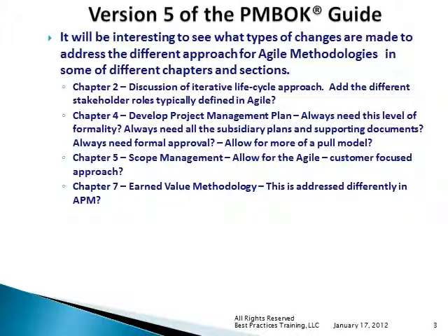In Chapter 7, Cost Management, where they're talking about earned value, I would definitely heartily recommend that they address earned value in Agile, that we can't do the traditional types of earned value techniques and measurements in Agile because we don't have a cost baseline, an S-curve that takes us out through the entire project. We don't have a BAC.